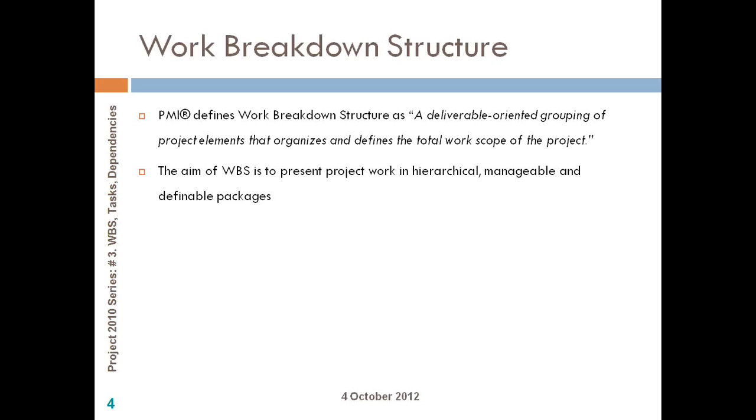The second step is, as per standard, the work breakdown structure, each element in your WBS, which is represented in a hierarchical manner, should ideally have a unique code. So the way in Project 2010 you define the unique WBS code is making use of the project ribbon.